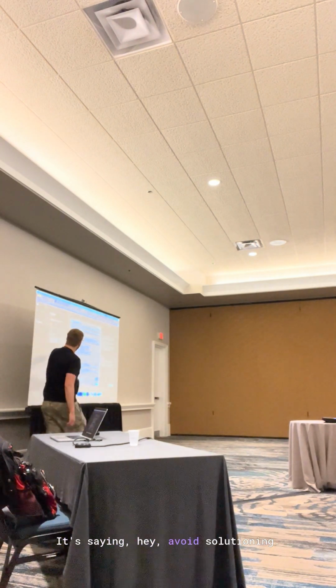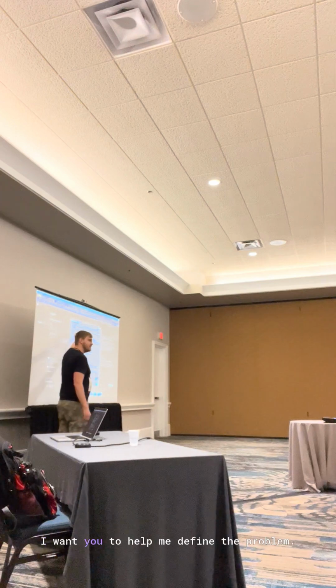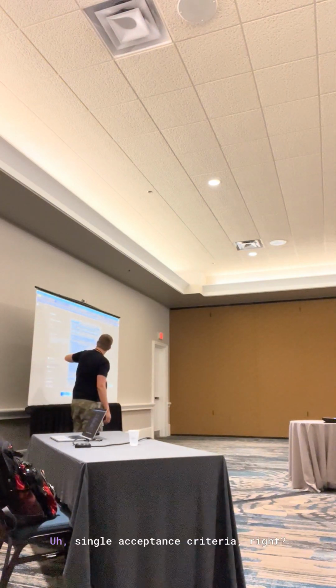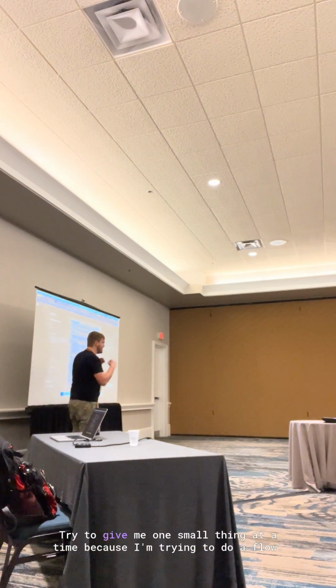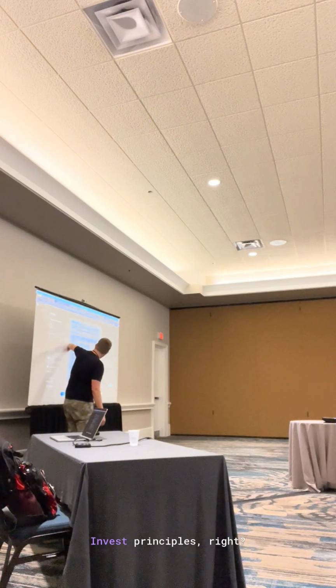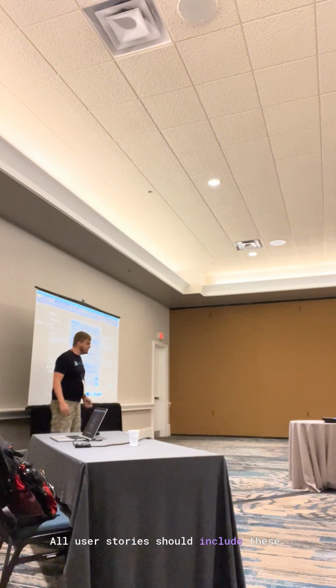It's saying, hey, avoid solutioning. I don't want solutions, I want you to help me define the problem. Keep the story small because I don't want giant epics. Single acceptance criteria, right? Try to do one small thing at a time because I'm trying to do a flow, I'm trying to deploy a little bit. And best principles, right? All user stories should include these.